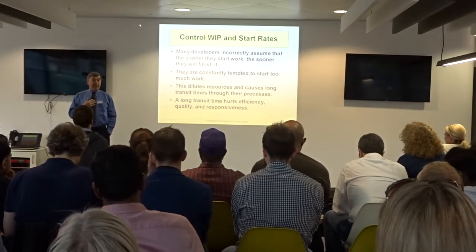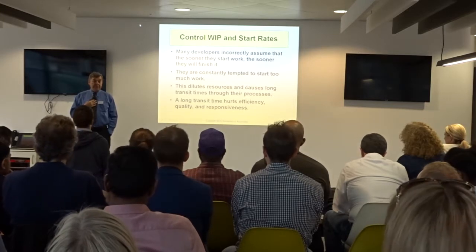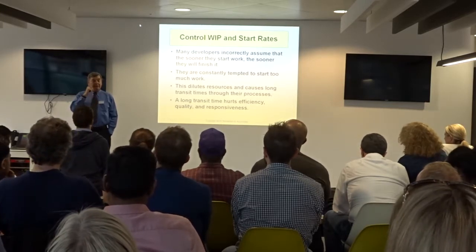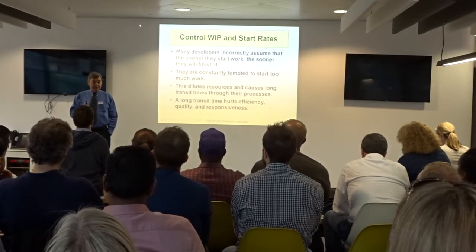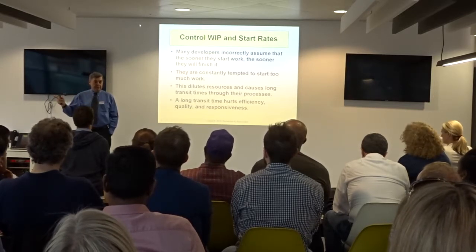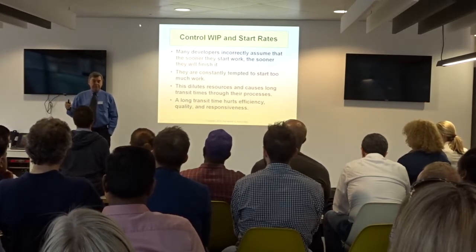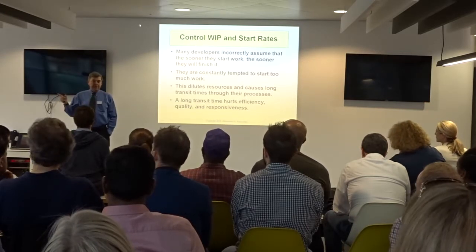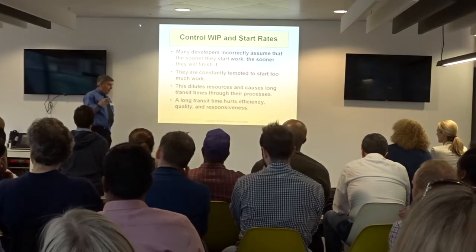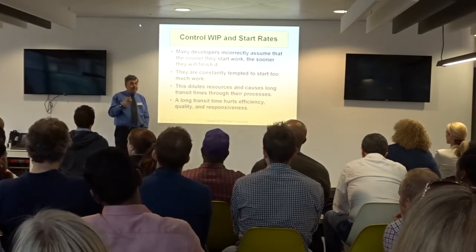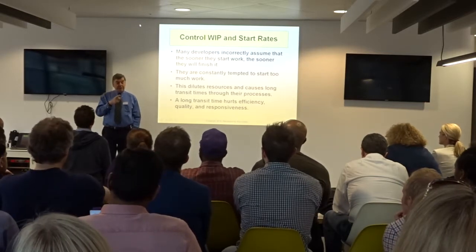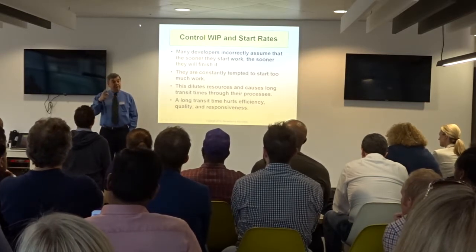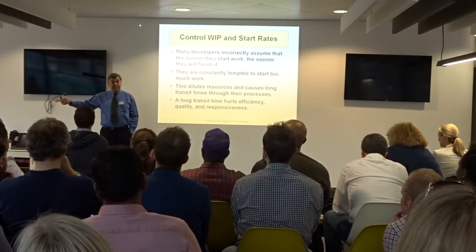And second, they would make the dispatch decision. They would say, who do we assign this to? And they would make the dispatch decision as soon as they had made the triage decision. They would say, oh, let's assign it to the person who wrote the code originally. So when they would dispatch immediately, they had lots of bugs in process at the same time. In fact, they had so many bugs in process that they were fixing bugs in modules of the code that were no longer in the product by the time they ended up implementing the fix.